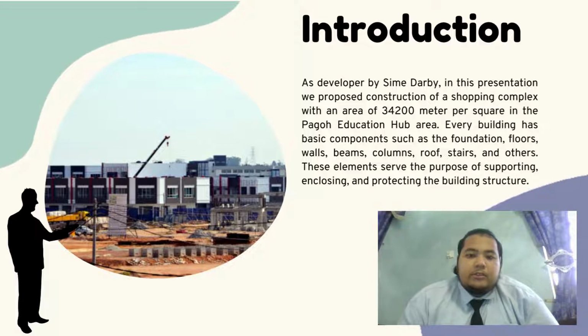In Malaysia, the Uniform Building Bylaws (UBBL) 1984, enacted under the Street Drainage and Building Act 1974, stipulate that all new buildings require submission of plans for approval prior to construction by a principal submitting person or PSP, such as a professional architect and professional engineer.